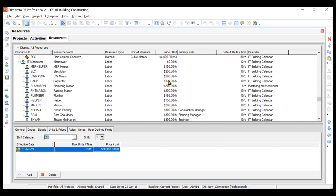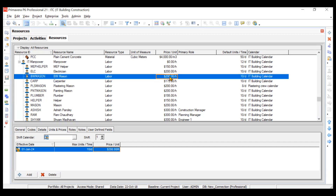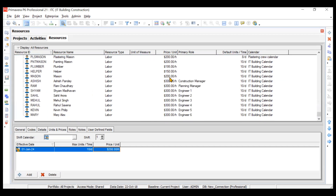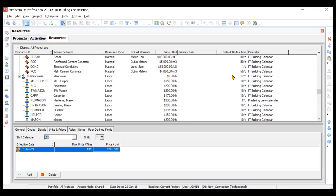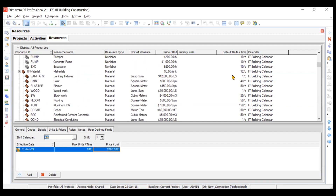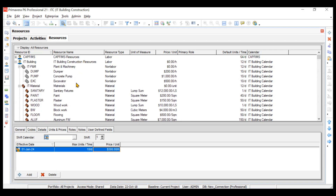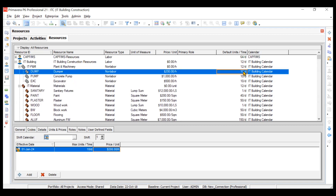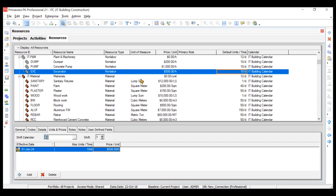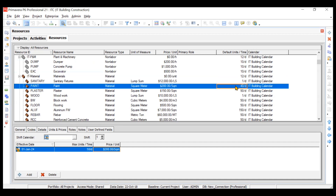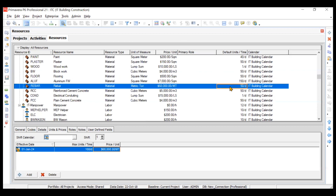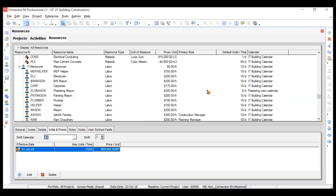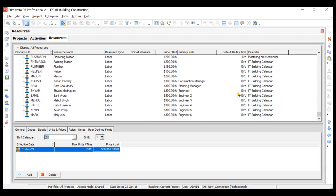Similarly for manpower, we have their charges per hour — one block work mason will charge $200 per hour, and one engineer will charge $300 per hour. They have default units per time — how many hours they work per day. All the machinery and plant will be working 10 hours per day. For materials, paint will require 40 square meters per day by default, and rebar requires 50 metric tons per day. Helpers and laborers have a fixed time of 10 hours per day.